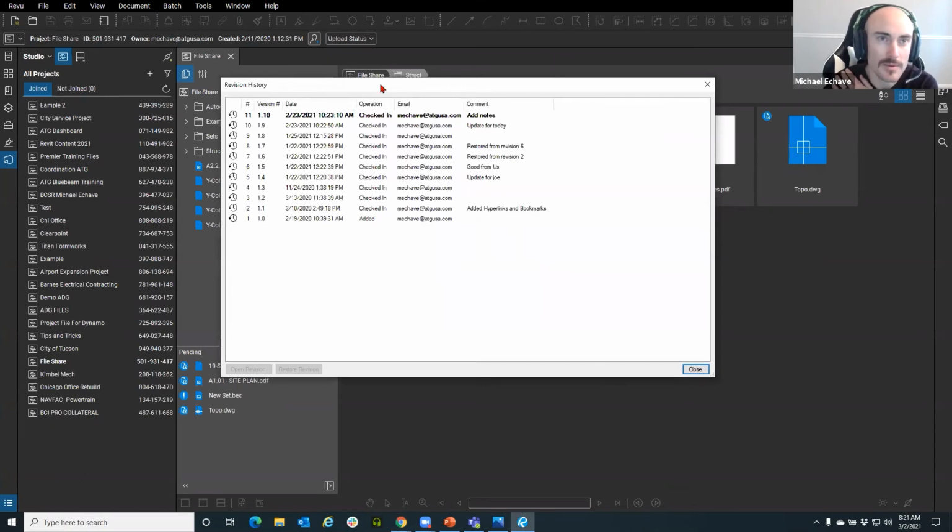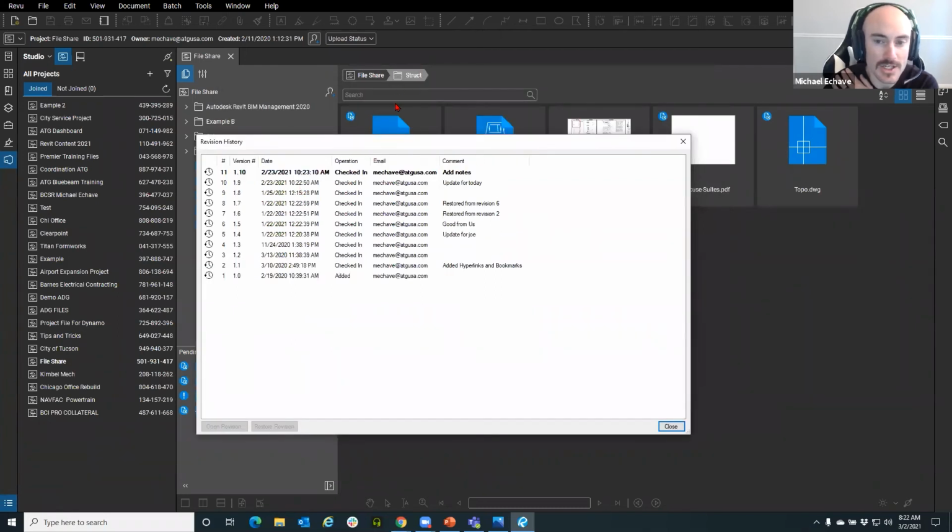So how Bluebeam Review Studio projects, mouthful, works is that it's a check-in, check-out basis. So every time you check in, you should comment. That's going to be best practices. You can tell here I was a little slacking in my best practices myself. But as you go through here again, you're going to add comments. And then from here, you can see and open latest versions. And the great thing about this is you can restore from that later version, right? So if I wanted to bring back version 8, it would bring it back to the top, but I could still come back to version 11. So every time you check it in, whatever markups were added during that check-in, it saves during that time and moves it forward.